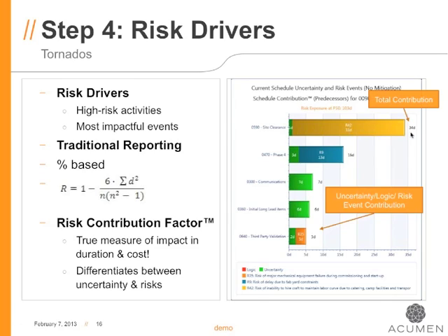However, is that 34 days because of uncertainty of duration, or is it just because it's getting hit by a risk event? And so the report here, by segmenting the bars and differentiating between inherent uncertainty, so the green is uncertainty, the color-coded bars here, so this site clearance with this risk number 42, it's interesting because even though site clearance is by far the biggest risk driver, the scope definition and the uncertainty of site clearance is negligible.